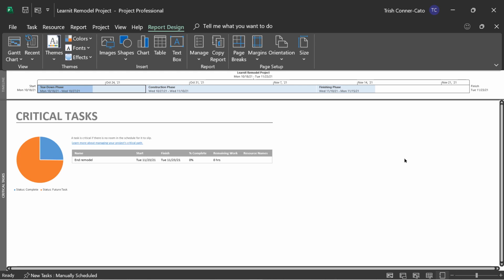When you have a highly sequential task list, like we do, which is recommended, so you put your task list together in the order that the tasks occur, almost all of your tasks will be known as critical tasks. Critical doesn't mean the importance of the task. It means that if you push a critical task back, it could cause you to not make your project finish date. That's what a critical task is.